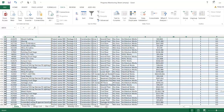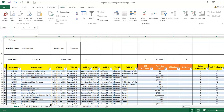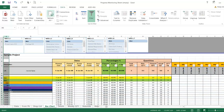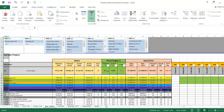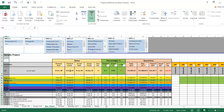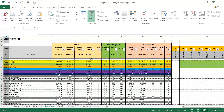Now all my data is from Primavera. I'll go to the pivot chart and click 'Refresh All' — and here my data is populated automatically. I can see planned start, planned finish, actual start from Primavera, actual finish. There are two options for forecast finish — leave it to the Excel sheet or enter it manually. I can also see day variance, planned percentage, actual percentage, percentage variance, total quantity, remaining quantity, planned quantity, actual quantity, and quantity variance.